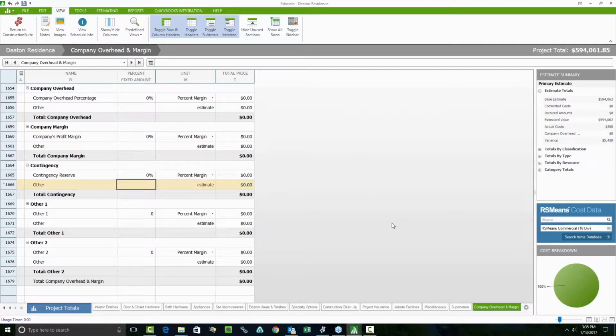So there we are. We're looking at a $594,000 job. It's almost $600,000. On a $600,000 job, if we're using percent of costs and we say that there's going to be a 20% of cost for our overhead, this 20% would go into the percent fixed amount column, or the percent column here. And as you're working your way into this, 20% of...